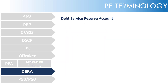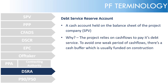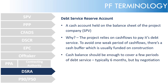DSRA: Debt Service Reserve Account. This is a rainy-day account — a cash account held on the balance sheet of the project company, the SPV. The project relies on its cash flows to pay its debt service, and from a lender's perspective, to avoid a weak period of cash flows, there needs to be a cash buffer, which is usually funded at construction. The cash balance should be enough to cover a few periods of debt service, typically six months, but this is all by negotiation.